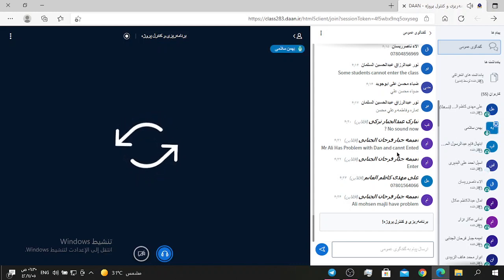Number 2, finish to finish, FF. A logical relationship in which a successor activity cannot finish until a predecessor activity has finished.